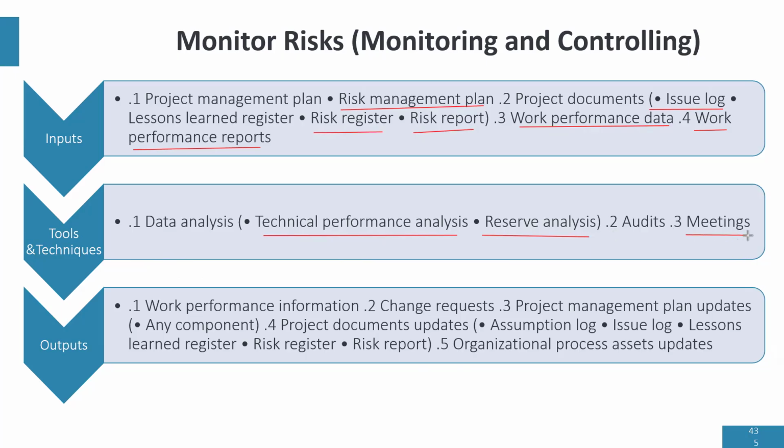Now, we're going to have meetings where we review risk. And after we review risk, we do risk audit. And based on the risk audit and reviews, we can decide to make changes and change our risk management plan, right? Change our risk management plan and how we are responding to risk in the risk register.